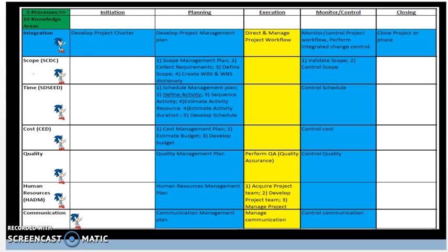So let's move forward. Similar to scope planning, we also need to plan for time. Recall that our project must operate within the constraints of scope, schedule, risk, and resource. Similar to scope planning, at the end of all schedule planning activities, we will have a schedule baseline. To create that baseline, we start off with creating a schedule management plan. The purpose of this process is to establish policies, procedures, and documentation for planning, developing, managing, executing, and controlling the project schedule or timeline.